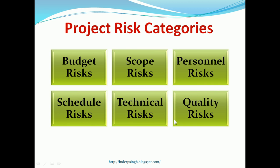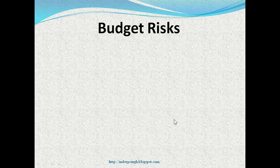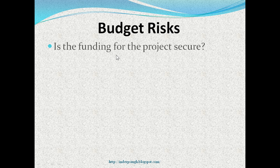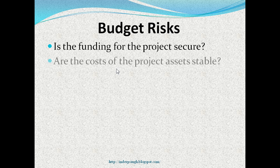Now let us see the questions to ask under each project risk category. First is budget risks. Is the funding for the project secure? Are the costs of the project assets like hardware needed, software needed and people related costs stable?